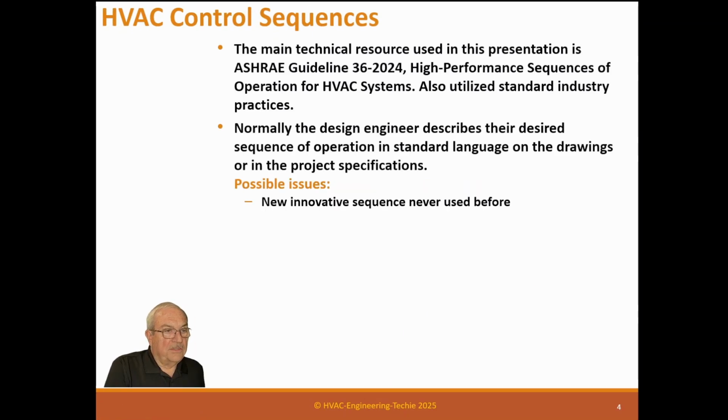So I always tell an engineer, if you're going to do that, then you need to put enough money in your contract to be able to train all those people downstream of exactly how this is supposed to work and why you did it this way. If you're not willing to do that, then you probably will not have a successful project. That sequence will probably not get implemented, or at least not implemented correctly. Incorrect logic or logic components.